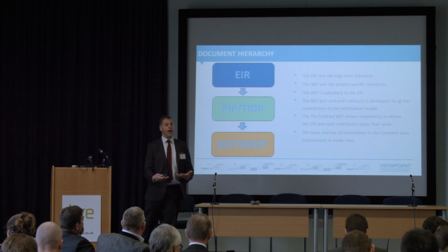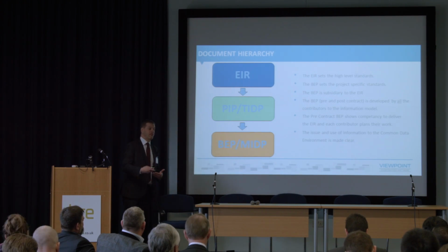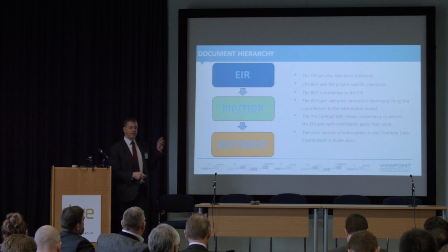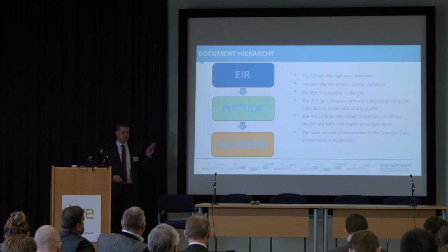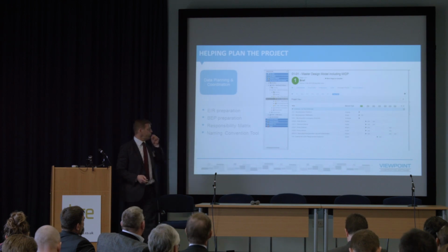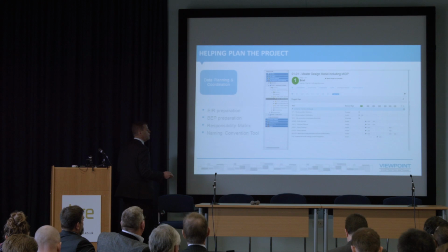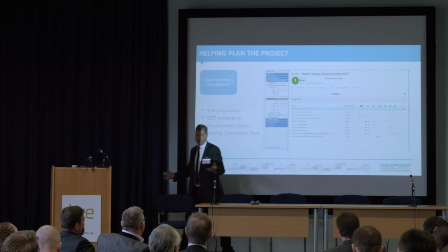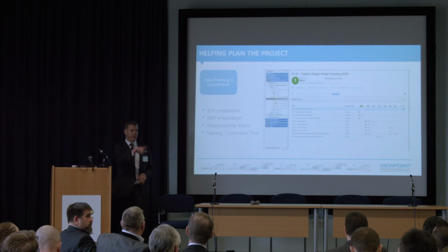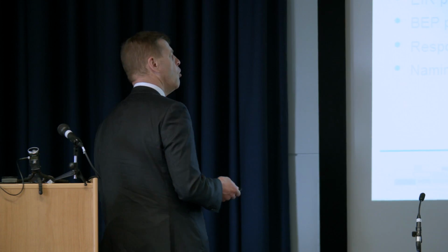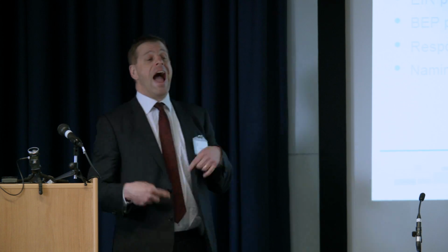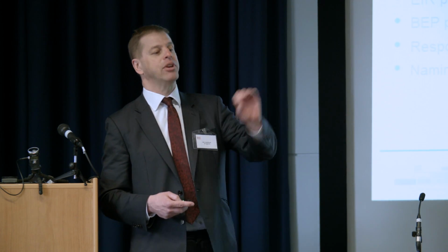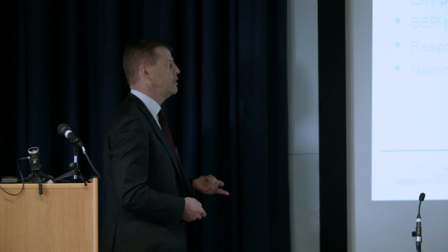So we would expect the whole of that process, that definition of task information delivery plans, master information delivery plans, to be accommodated within a CDE. So, certainly in terms of beginning to set out what traditionally has been done in an Excel spreadsheet. Everybody's done this for years. They've said, I'm going to deliver these things at these stages, and it'll be these people that do it. So what we're saying now is this should come into the common data environment and those deliverables be monitored. So it will say, well, you said you were going to deliver this. Has that happened? Yes, it has. No, it hasn't. And be able to report on that.